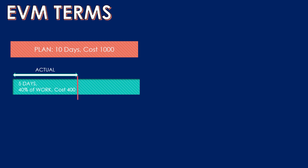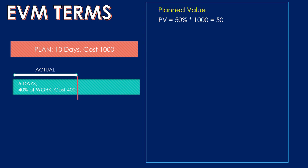Let's look at the terms involved in earned value management. The first is Planned Value (PV): as of five days into the project, the planned value is the sum of the budget authorized according to the plan. After five days we should be 50% complete, so 50% of the total planned cost of 1000 gives a planned value of 500. Earned Value (EV) is the value of work already performed, expressed in terms of planned cost. We completed 40% of the work, so 40% of 1000 is 400 — that is the earned value.